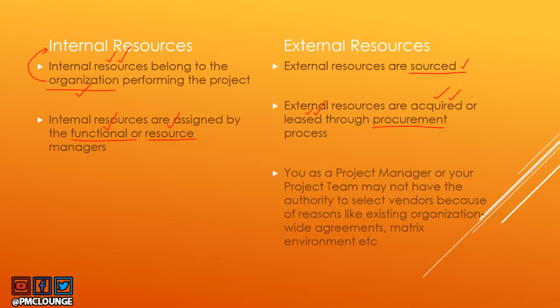Now, you as the project manager or your project team may not, "may not" is the keyword, have the authority to select vendors here. So when you want to, let's say, acquire a resource or lease a resource, you as a project manager may not have the authority to select the vendor. And this could be because of reasons like existing organization wide agreements. So there are existing organization wide agreements wherein a vendor is already engaged to support every project of this organization.